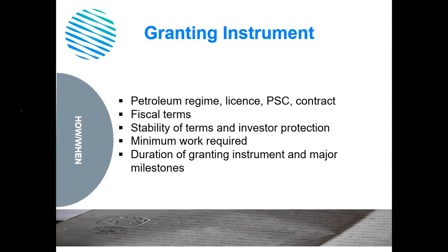Of course, a really important clause within your contract, or on your license, will be the minimum work required. So, for example, if you're at the exploration stage, what minimum work will you be required, the number of wells to be drilled or the amount of seismic to be shot?